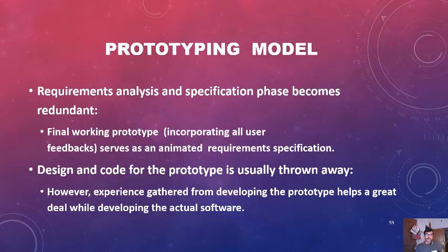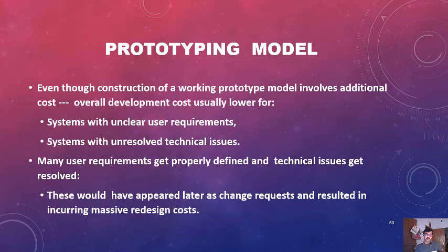Design and code for the prototype is usually thrown away. However, the experience gathered from developing the prototype helps a great deal while developing the actual software. So this design will be thrown away and the actual software is then going on. Even though construction of a working prototype model involves additional cost, you can understand that if you construct this working prototype, then it will involve the additional cost.